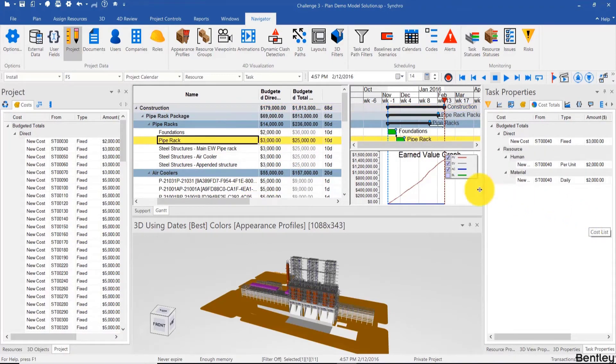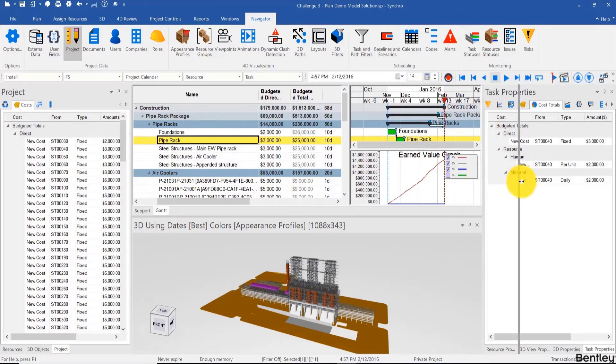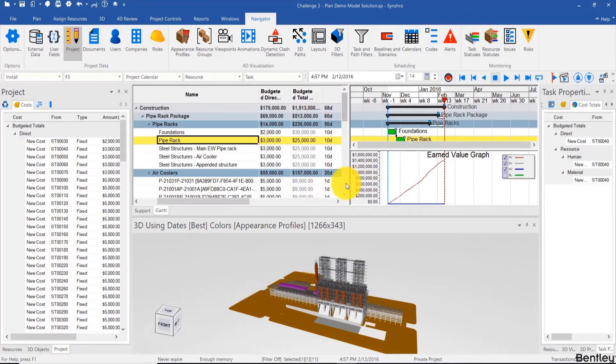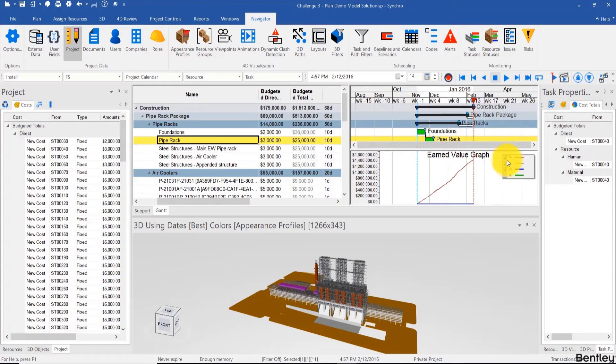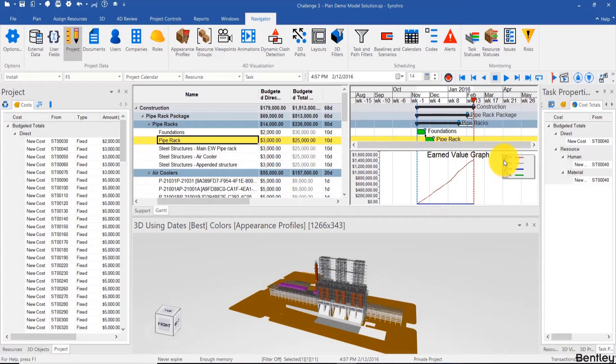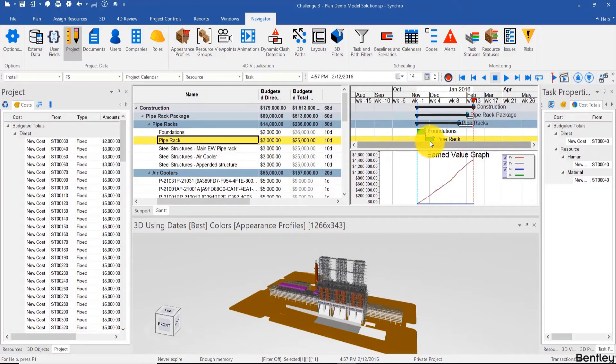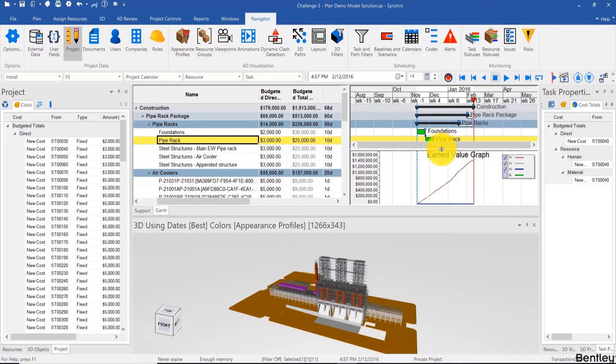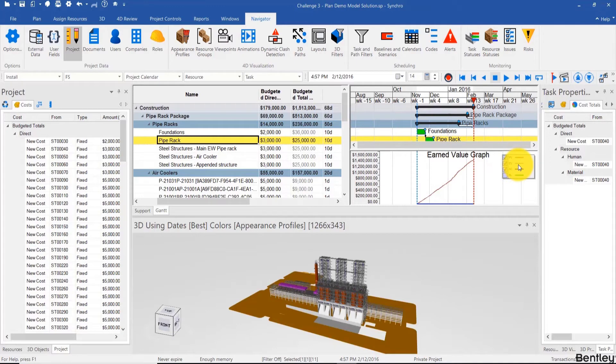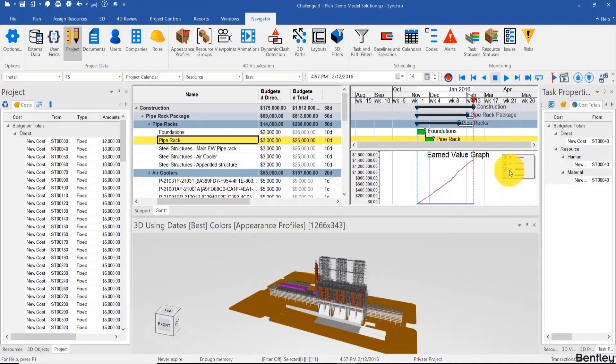Now what's left here is to interpret costs from the earned value graph as well. So we see different legend items but really only one curve. So this is the planned value, meaning that this is the cost associated to each task spread over time as it is planned. The earned value will consider how much of those activities you've completed and will disregard how much you've actually spent, because it's actually a schedule metric with dollar value units. And then the actual costs, we'll look at that in the next video detailing how to actualize costs and schedules, so I'll kind of skip over that for now.